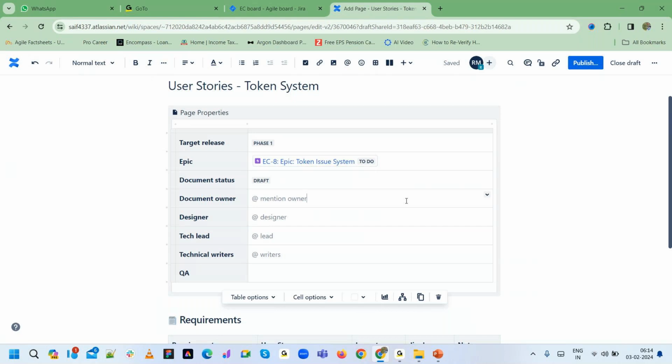No, no. A user story is the activity which you have to do. User story points indicate the complexity, big, small, or medium kind of thing. So instead of calling it a big, small, or medium size requirement, I can indicate the complexity in numbers, right? If it is 8, it is more complex. If it's 5, less complexity. If it is 3, simple. If it is 1 or 2, it is very simple. Correct? So the story points are under user stories, right? Yes, for a story, you define.